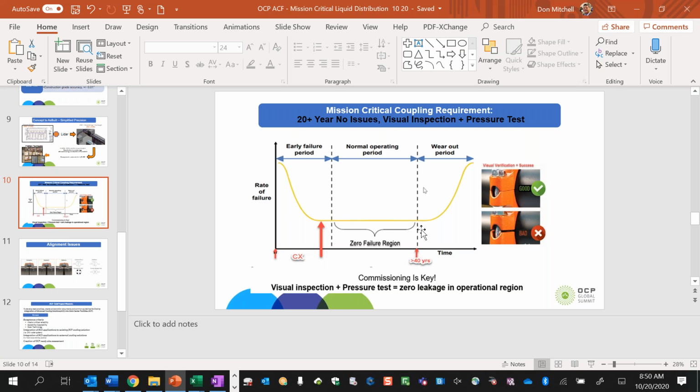What I would propose though is recommending and giving guidance on failure mode effect analysis, right? Now, I think there where we could give people guidance to rank the probability, the severity, and what containment strategies they have in place, right? And that might be more valuable than trying to give some MTBF guidance that you may or may not have enough data coming from industry to do anything meaningful. It's something I may want to talk with you offline, because it sounds like there's a whole lot to expand on from what you just said there.